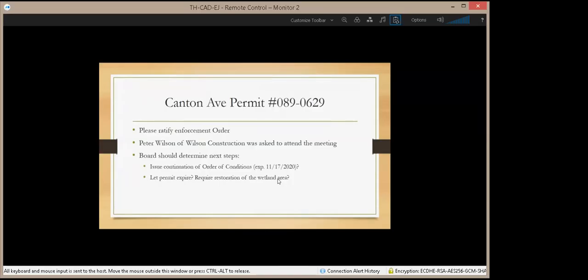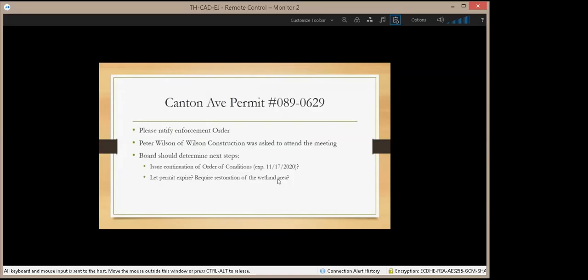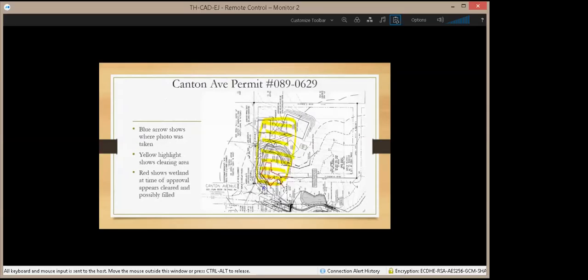Okay, thank you. So Bob, if you want to give us an update on what's going on out there, or any sort of clarifications. Yes. Erin, could you put the lot plan back on that you showed us? Sure. So I have spent some time out there, especially yesterday and about a week ago, and I did mark all the flagging that I could find. There are flags missing. There has been the clearing of some brush, and some trees that were dead have been cut. No grading has taken place. All of the clearing of brush has happened in the buffer zone; most of the lot is in the buffer zone. The area shown in red, those flags are missing, but the area seems to be intact. I did measure the flag that is the leftmost.